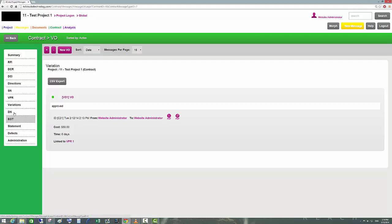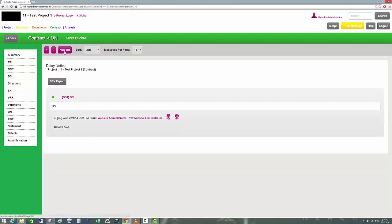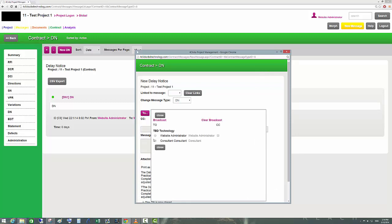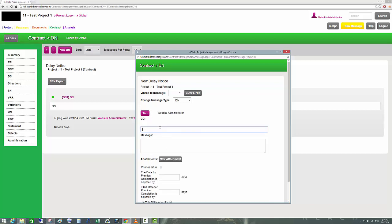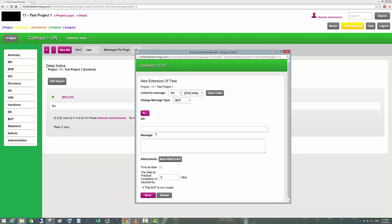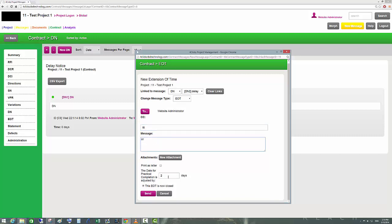Extension of Time and Delay Notice — this is where a contractor requests a delay in hours or days, for example two days. An Extension of Time will then be issued relating to this delay notice. The project manager issues the extension and the delay notice is now closed.